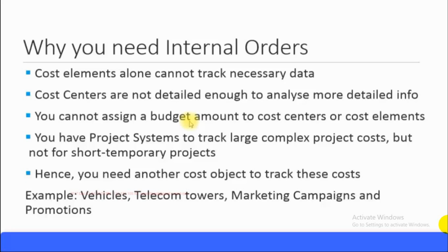You have the PS module, which is the Project Systems module, to track large and complex project costs. In that you create project codes, and under each project code you have WBS elements, which is your work breakdown structure. Under each of those WBS elements, you can track the stages of that particular project and their costs. But that is not applicable for short-term and temporary projects.